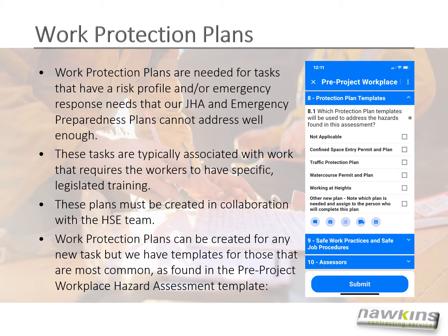Work protection plans can be created for any new task, but we have templates for those that are most common, as found in the pre-project workplace hazard assessment template. In this template, you can select the need for a work protection plan associated with confined space work, traffic protection, watercourse work, or working at heights.